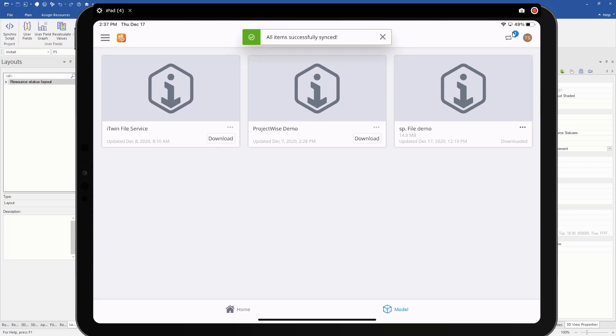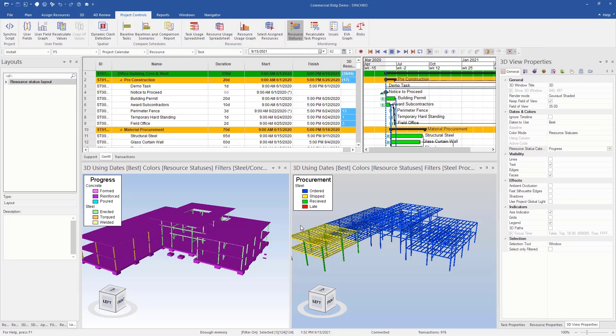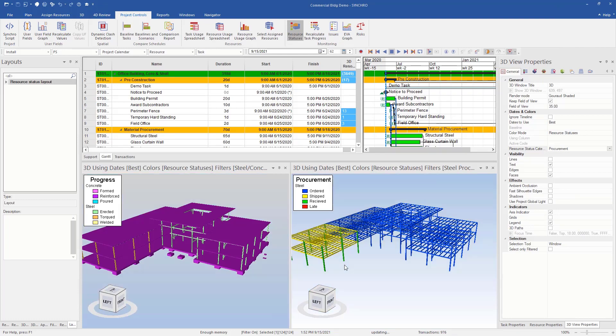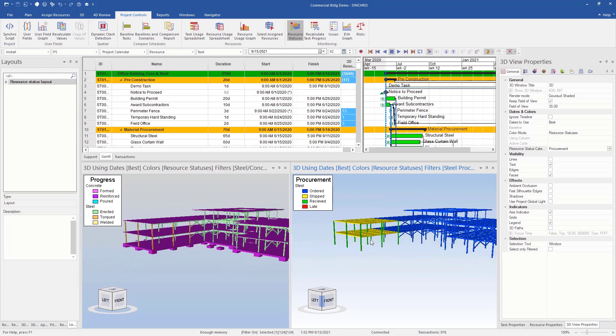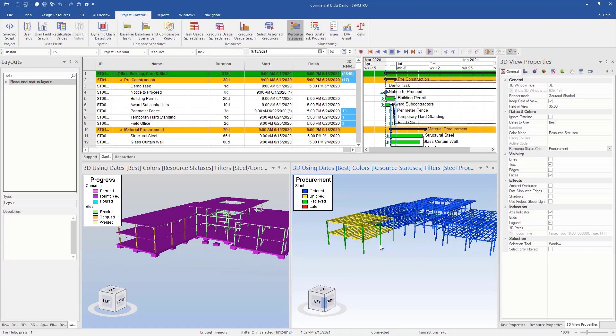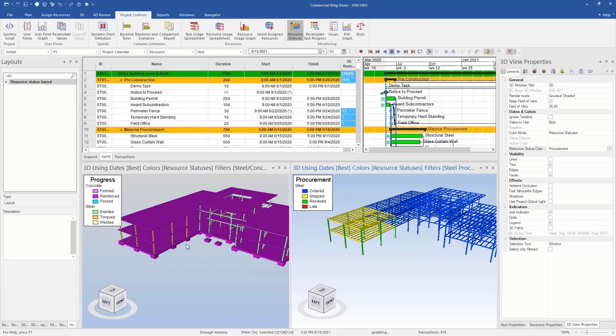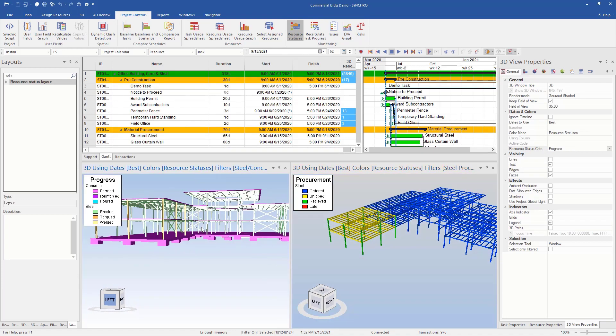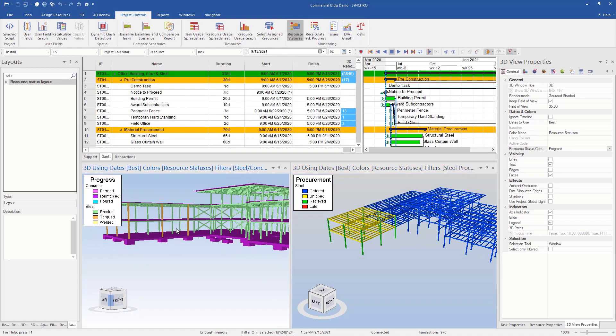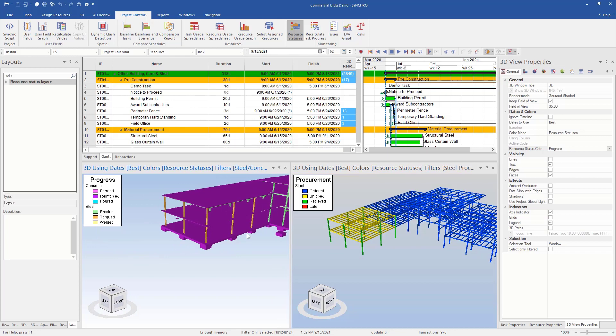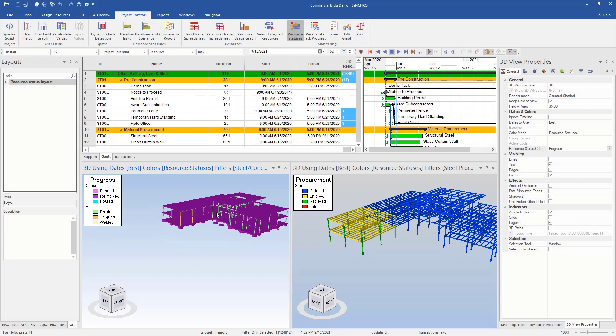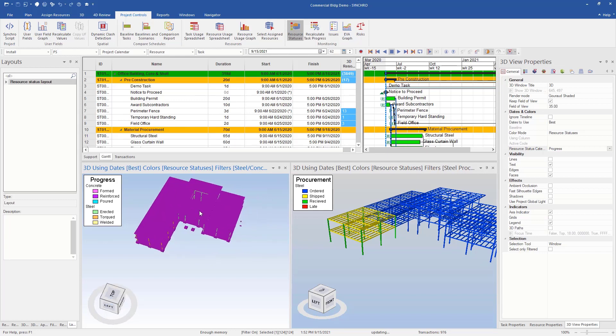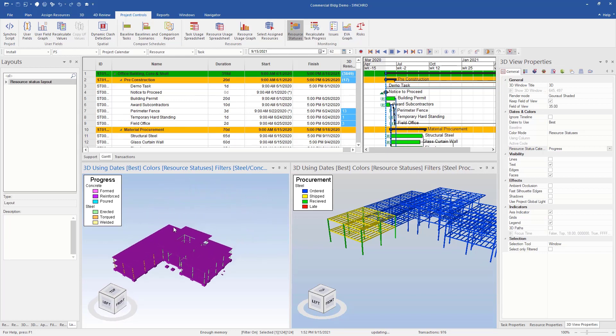So now we'll go back to our pro project. So now that we're back at our pro project here, we can see that the procurement, that all the items have been received. They're all green. And then when we go to our progress, we can see that the five outside steel have been updated to torque, and all the cement has been updated to reinforced.